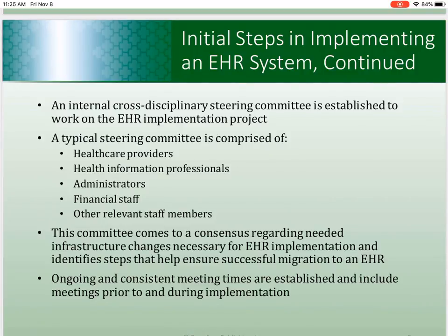The members then come to a consensus as to what changes need to be made to the infrastructure and draw up a plan that outlines the steps needed for successful migration to an EHR system. The committee also examines policies and procedures in support of EHR staff and resources with regard to implementation and maintenance. And during the implementation process, the committee should meet weekly to address implementation issues or challenges. And sometimes you have subcommittees that might also meet weekly, or if there's something super important going on, they may meet more than once a week.